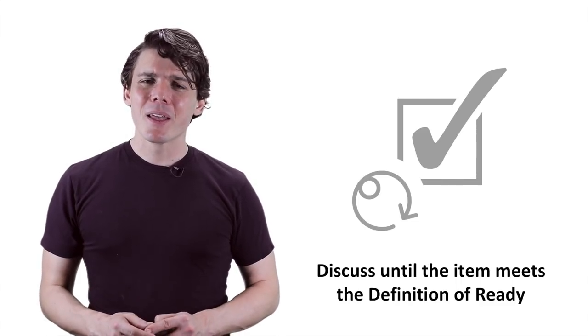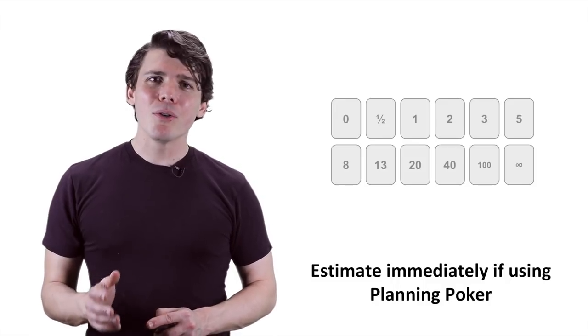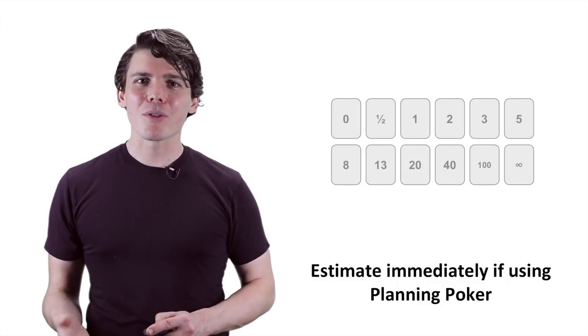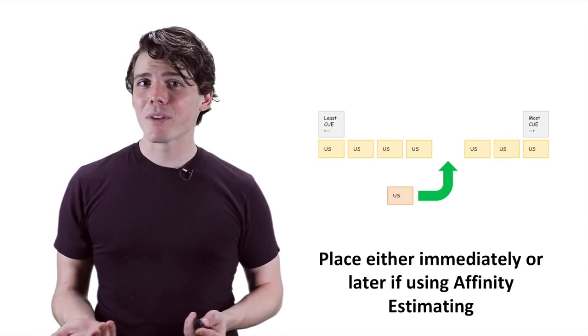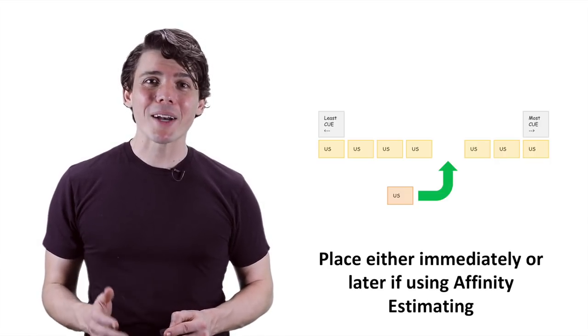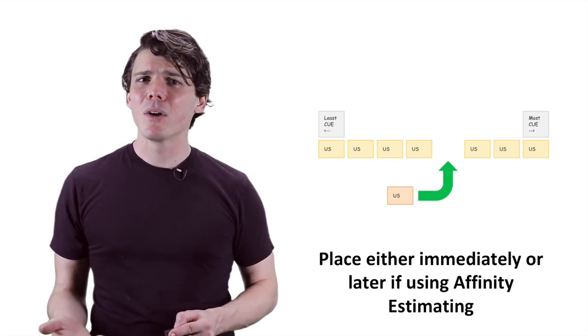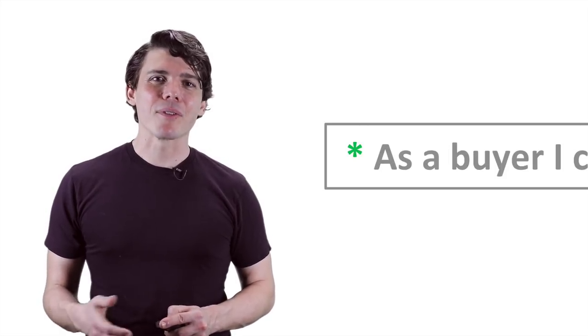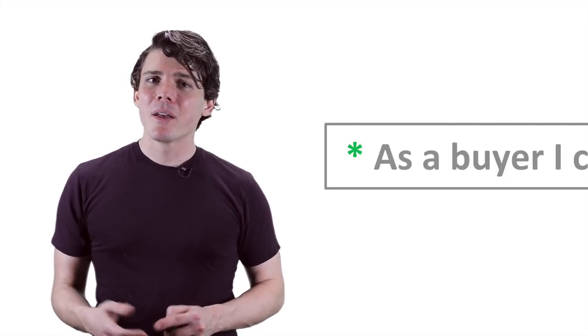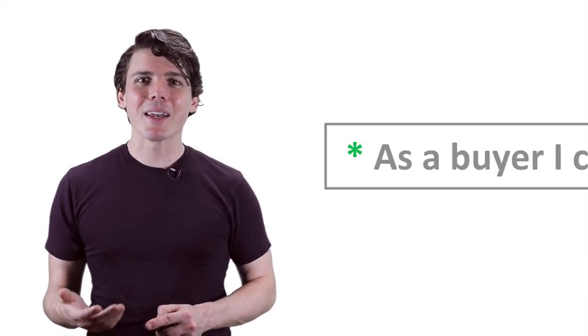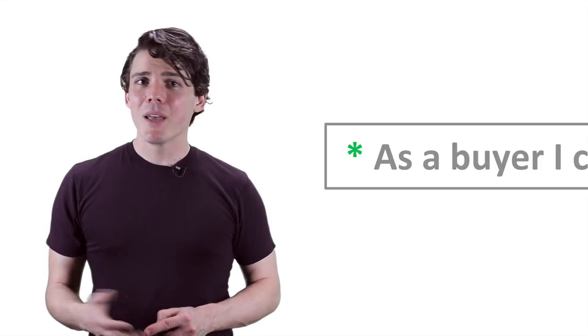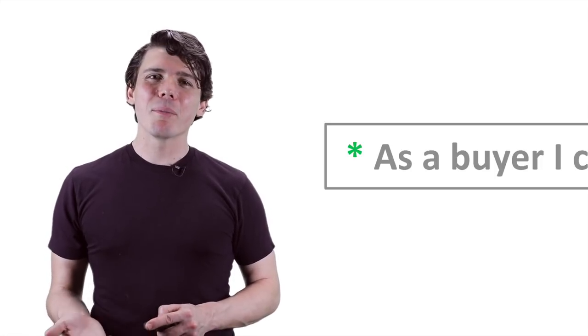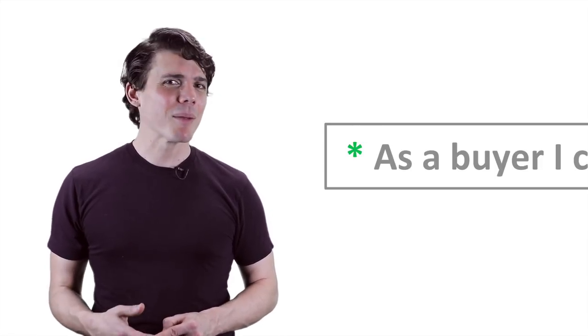Then estimate. If you're using planning poker to estimate items, do so immediately following the discussion so that it's still fresh in your mind. If you're using affinity estimating, you can place the item in its correct relative location immediately after discussing it, or wait until you've discussed everything to sort them. Once the user story is ready and estimated, mark it as ready. I like to prefix the item's title with an asterisk to indicate that it's ready. This works great when you've got several pro-forma sprints lined up following your release planning session. If you don't do release planning, you can simply create a pseudo-sprint called ready and place items in that sprint.